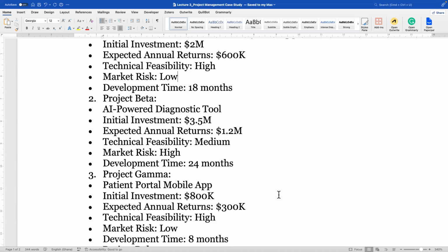Oh, yes, we said that. And then we also have to plot the projects in the matrix to know which ones are white elephants. If you are not careful, you are likely to pick a white elephant and combine it with maybe an oyster. And the white elephant may have a high initial investment, which may affect the potential oyster. So you have to sit down and determine how you are going to mix the projects to form a project portfolio.